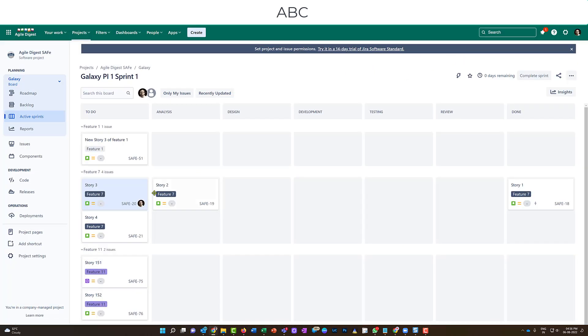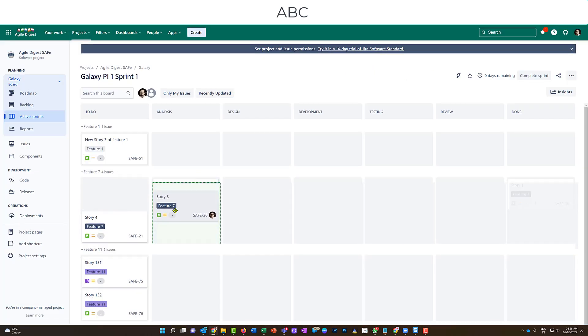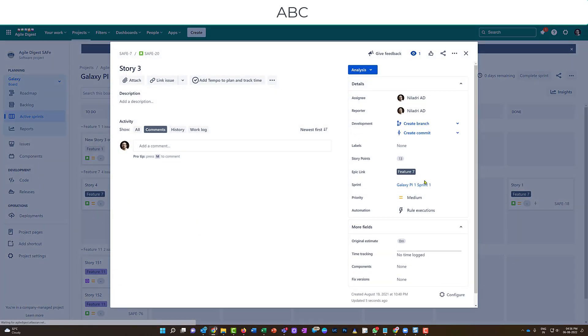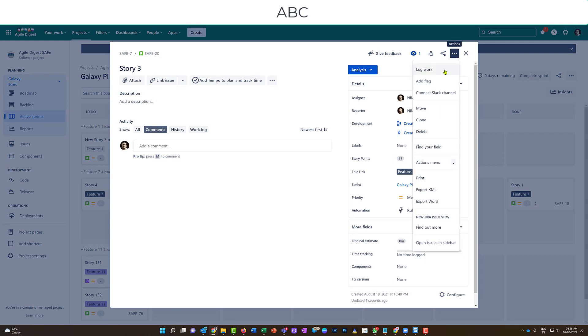So if I click on any story that is in to do, this time tracking is not coming up here. If I click here, the log time, log work is also not coming up. But if the story, if I move it to analysis, and after that I want to click on that, I can see the time tracking is coming up and the log work is also coming up.